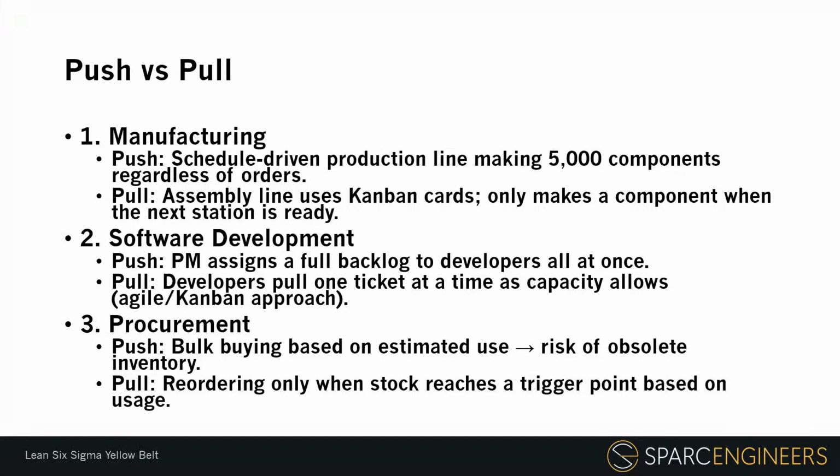In a push system, a project manager might assign the entire backlog to developers all at once. This overwhelms the team, creates multitasking, and causes work to pile up in various stages without finishing quickly. Lead times increase, and quality can suffer because attention is spread too thin.